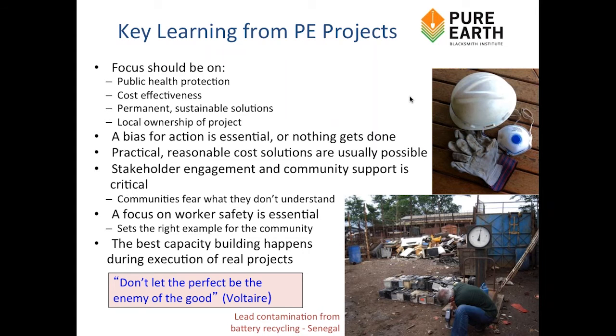Okay, as I mentioned, in every single project that I or Blacksmith has ever done related to lead, the question of groundwater contamination has come up. First, the first answer on that is to sample the groundwater. Where there are wells nearby or water bodies nearby, ponds or streams, you sample that. You get the analysis, and you show that to the government leaders in the community and say, see, this groundwater is not contaminated. This is very low level. That's generally what happens.